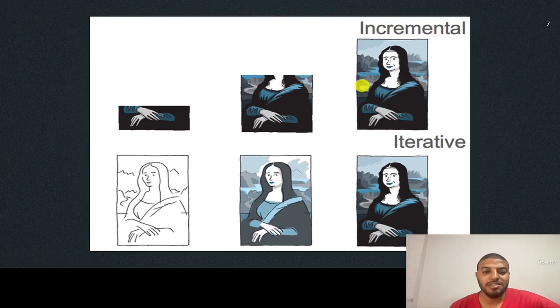In this case, it is better to work in an iterative way. So you will paint the three rooms, and then add lighting to the three rooms, and then add furniture to the three rooms. But if we assume that you are extremely rich, and you have a house that includes 1,000 rooms, in this case, is it better to finish the painting of all the rooms? And then, for example, let's say that your wife does not like the color of the rooms. In this case, you will paint the 1,000 rooms again.